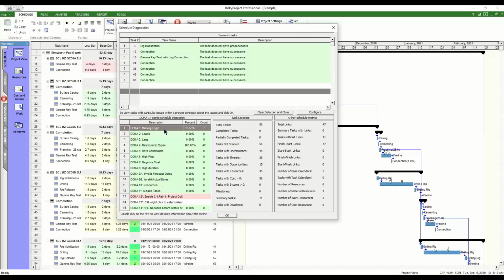Each activity should, unless it's like these, have a predecessor and a successor, so that any updates on the precedent network are felt or pushed down the precedent network. Otherwise, you can have an activity that runs extremely late, but if it's not linked in properly, that effect will not be seen on what should be its successors or at the project level.